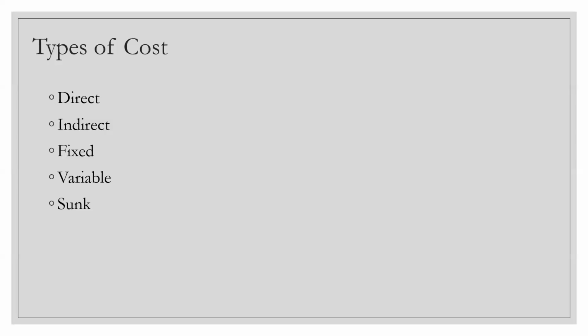Okay. So they may say that we already have spent 30,000, so why not spend 20,000 more and complete the project, right? But that's when the decision has to be very fine-tuned: our decision for the future should not be dependent on the money we have lost in the past. Just because I have spent X amount of money doesn't mean that I have to spend Y amount in the future to ensure the project is completed when it's not going to give you any return on investment.